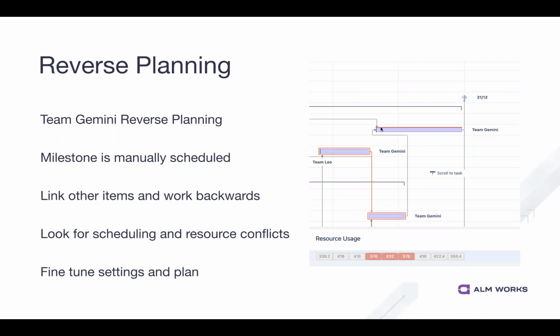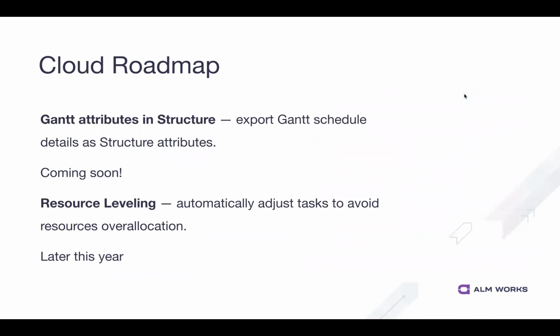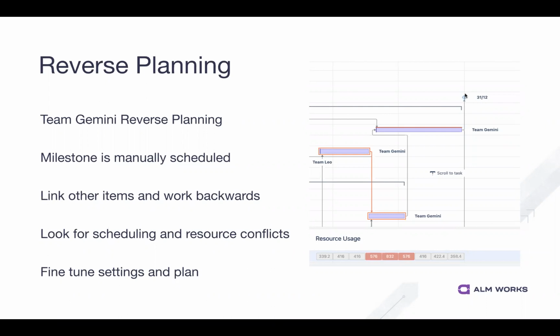The other thing worth noting is this red hat here is telling me that this epic has got a scheduling error. And of course, that's this link here that's not being respected. If I did respect this link, it would start right here at the edge where this one ends. And then we would just move the error up here to the milestone, and it would get its own little red hat there showing that it has a scheduling problem. We can often understand what's going on by that.